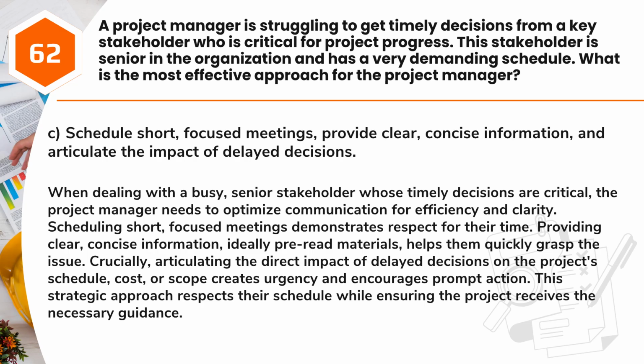Answer: C. Schedule short, focused meetings, provide clear, concise information, and articulate the impact of delayed decisions. When dealing with a busy, senior stakeholder whose timely decisions are critical, the project manager needs to optimize communication for efficiency and clarity. Scheduling short, focused meetings demonstrates respect for their time.